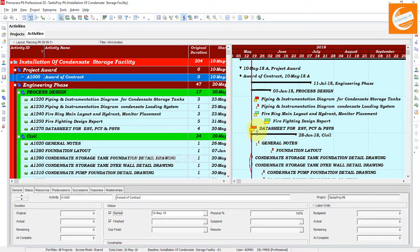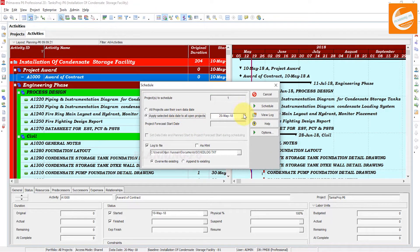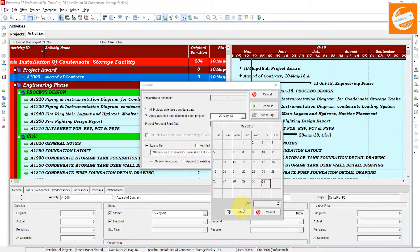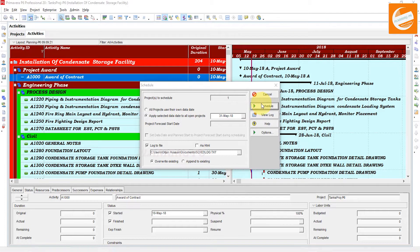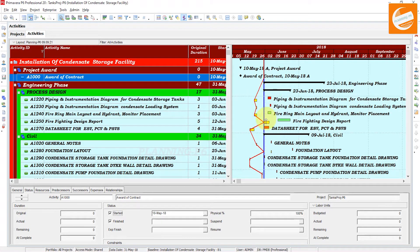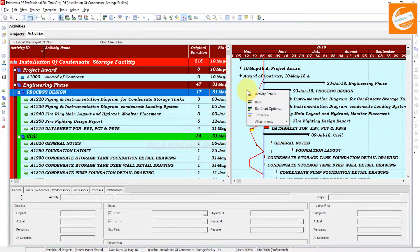Now you can see the progress line. If I schedule a little bit more, like my data date is 31st of May, and schedule again — now you can see the difference from the baseline. You can customize it and fix it with start and finish dates. To do that, just right-click here to watch the progress line behavior.